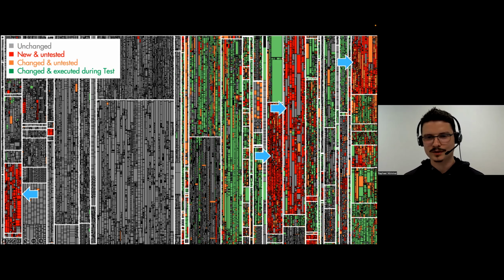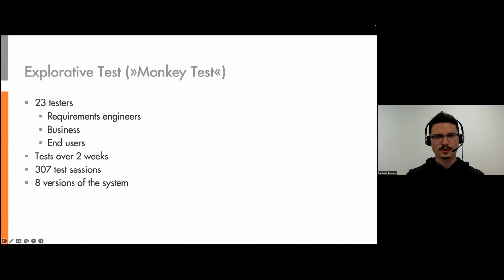They had a project going for developing an automated test suite, but that didn't work out. So the project just did not finish until the time, and no automated tests were executed at all. So they just had these huge gaps in their tests. And in addition to that, there was also a communication error where the test factory in India actually didn't receive any test cases for these areas either, because nobody created manual test cases for these, because they were intended to be automated. So what they did then was delay the release and perform an exploratory test.